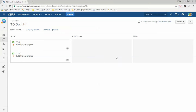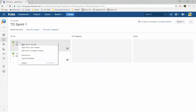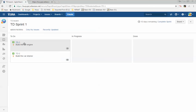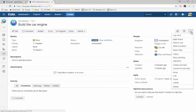Sometimes one story is worked on by many people. How do you manage that? We break the story down into sub-tasks. To do that, right-click on the story link — for example TD1 — right-click and press Open Link in a New Tab. Once in the new tab, click the three dots on the far right and press Create Sub-task. I'm going to break this story into three smaller tasks.